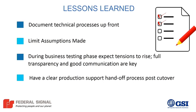We built 9.1 about a year and a half past. So when the technical team was working to upgrade to 9.2, of course they're going to start with the most recent environment. So they brought 9.1 and they upgraded it to 9.2 because the first leg of the upgrade was done. But then when we were ready to cut over, nobody told them, because it was a new technical team, that the security table hadn't been maintained. We weren't in dual maintenance for a year and a half.